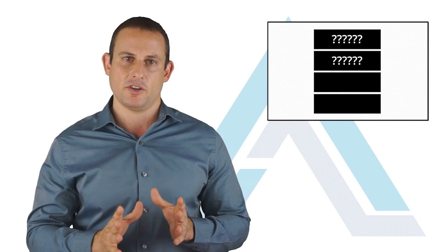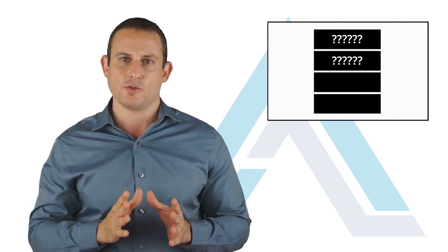An unrefined product backlog. A sprint should never start without the product owner knowing exactly what requirements will make their way into the sprint backlog. These requirements should also include enough detail for the development team members to get their teeth into. If these requirements are not ready for the sprint planning session, then the sprint will likely be dysfunctional.